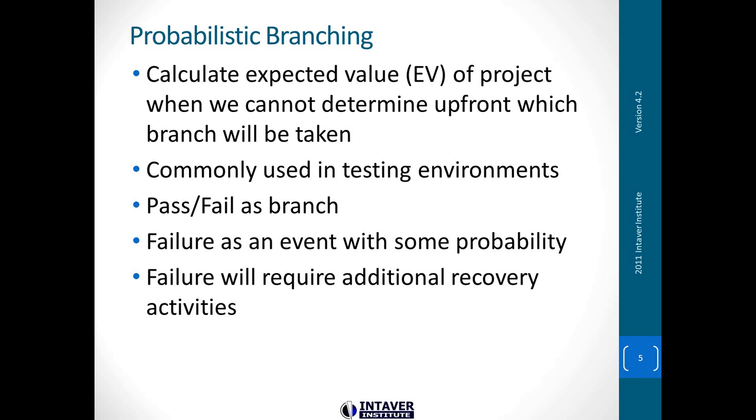It's very common to be used in testing environments, where there is a test that's going to take place and there is a pass and fail branch. If we pass, we move on to one activity. If we fail, and especially in this branching, you're going to go into a recovery type activity where you may be doing some analysis, some more design, and then a little bit more construction, and then you'll be able to go on and continue down your project.